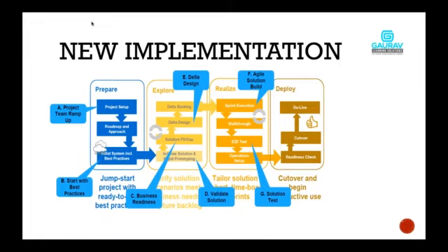So it is not necessary that you will only arrange one workshop. There can be a sequence of workshops. There can be one workshop only on vendor master data, another workshop which is only on vendor invoices, and a third workshop which will be only on payments. During those workshops, you will be collecting the fits and gaps.